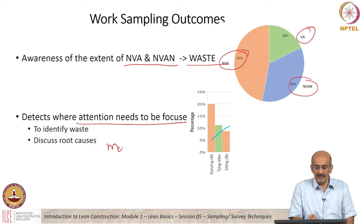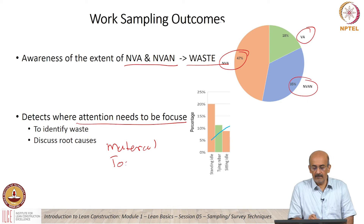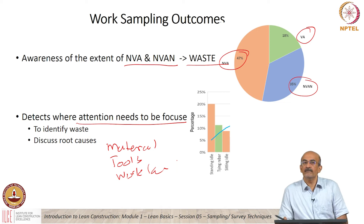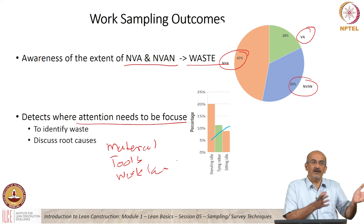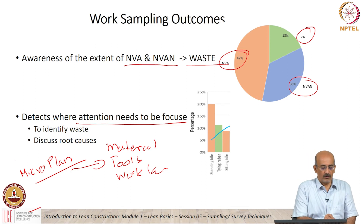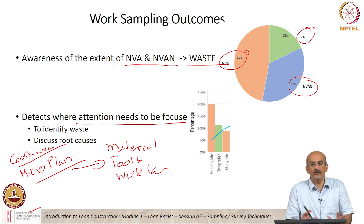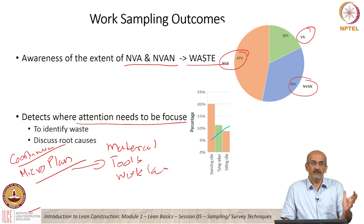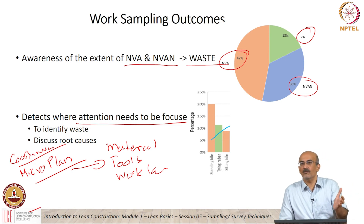Are they standing idle because of materials? There are many things — tools, work face, lack of instructions — many things that contribute towards why somebody might be idle. Unless you address those, and a lot of times this goes back to micro-planning, your micro-plan or coordination. There is no coordination between crews, there is no micro-planning — there are a lot of issues there. When you go to this level, you are at the lean level. You have to have coordination between crews and a proper look-ahead plan.